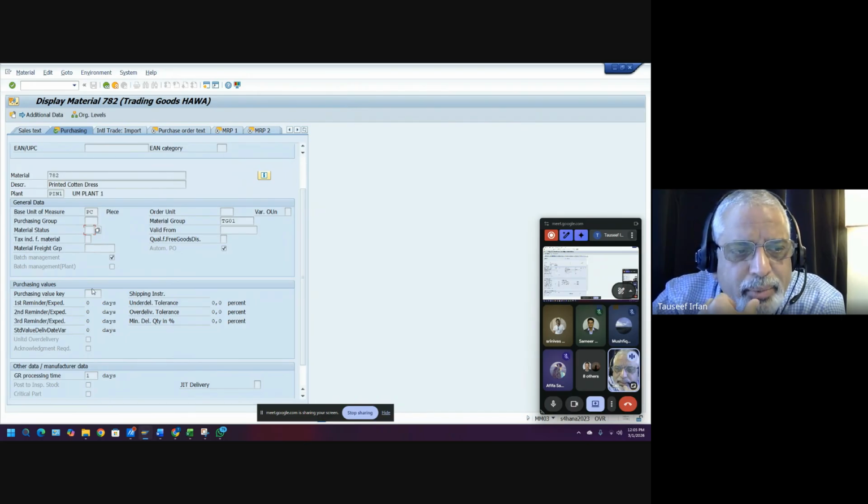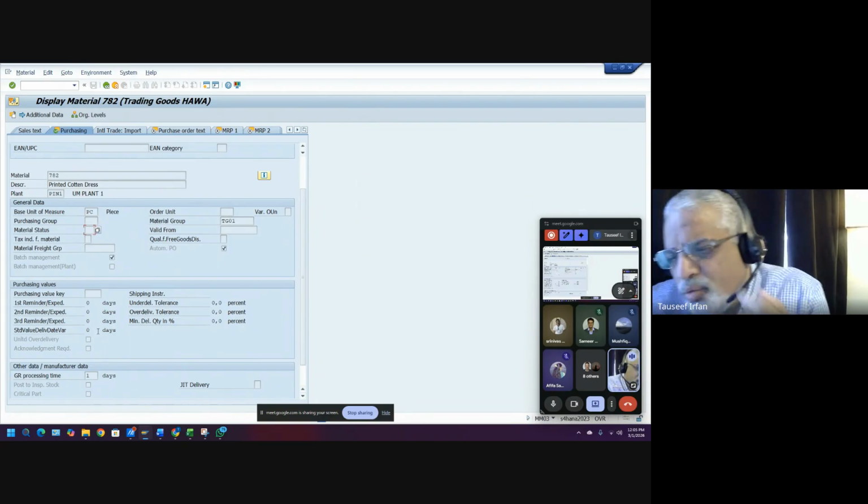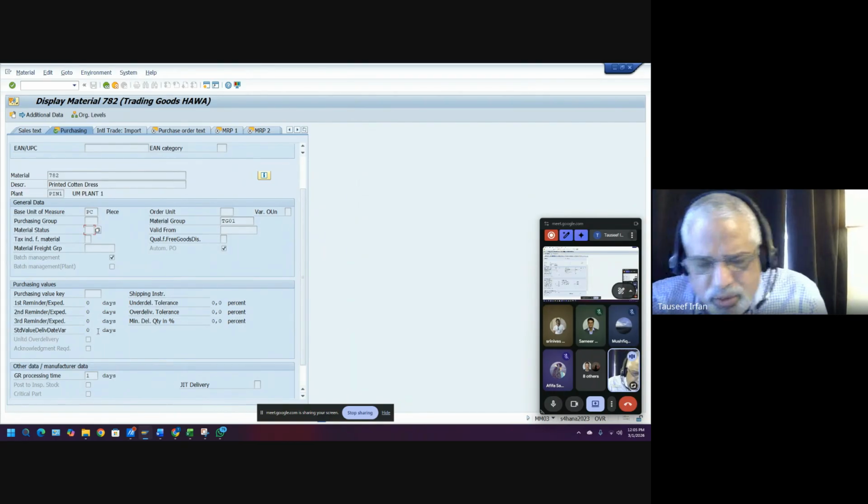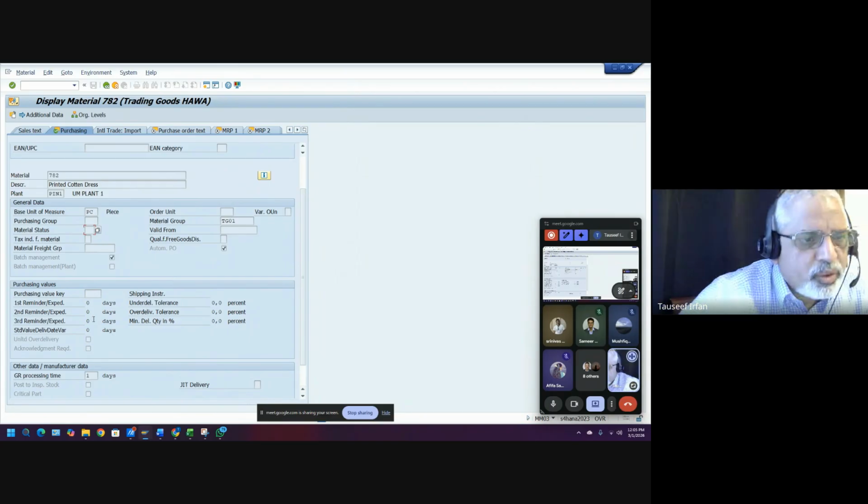For example, the lead time is 6 months. You want the first reminder after 30 days, the second reminder after 60 days, and the third reminder after 90 days. Why are you reminding? Because you want to know the status of your purchase order. So you can set that.